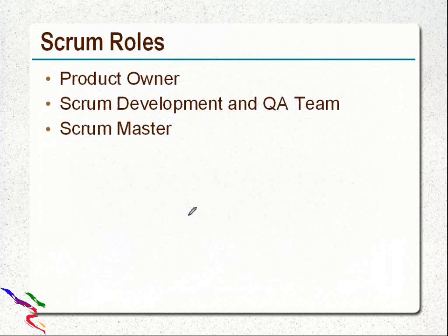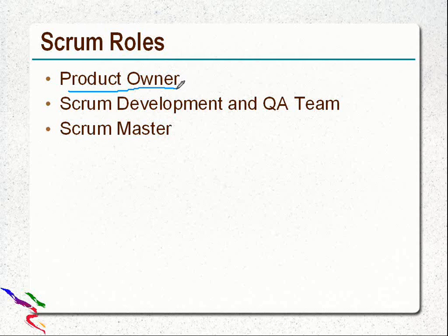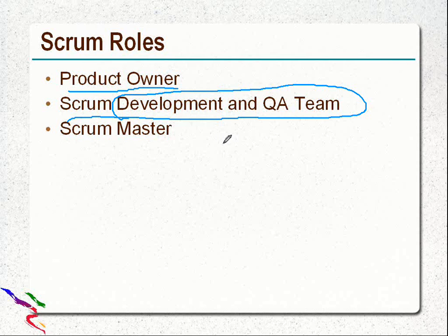Let's look at Scrum roles. First, the Product Owner — the product owner is basically a key stakeholder and represents the user or customer, and is responsible for the requirements for the release. Next, the Scrum Development and QA team. Although team members should be cross-functional and work in both development and testing, there are times when you need to separate out these teams. In most cases, if your team size is bigger than seven members, you normally break it into two parts: development team and QA team.